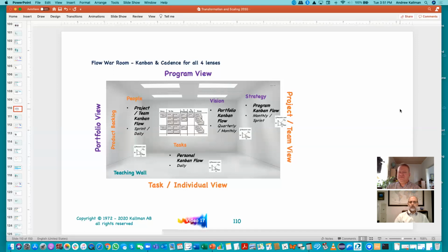And what we saw as we addressed those two forms of waste is that time was compressed on that product owner board. So where the team essentially was producing different products using the same process steps, as they worked out the dependencies and the rework, it went from a very long time period for the first project to the second and the third. And then they had very repeatable performance. And that was all visualized, so the team could see the results. Stakeholders could see the results. And so the fruit of their effort of eliminating waste, you could visually see on that product owner program board.